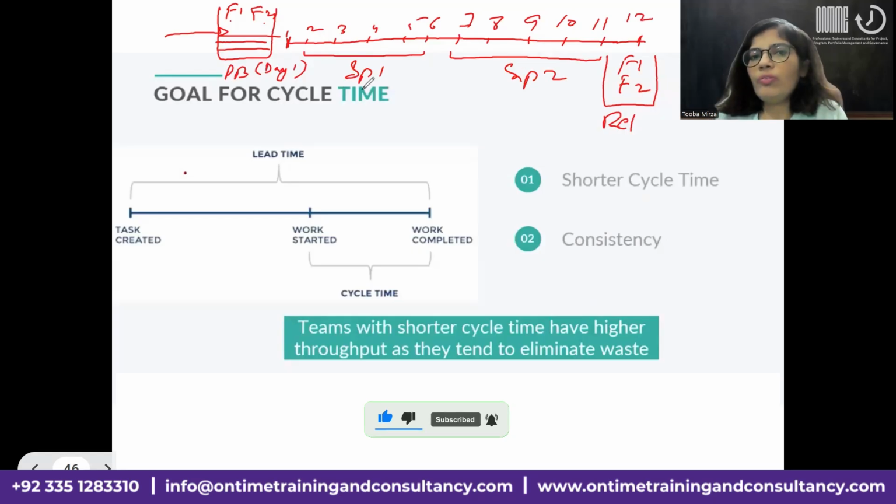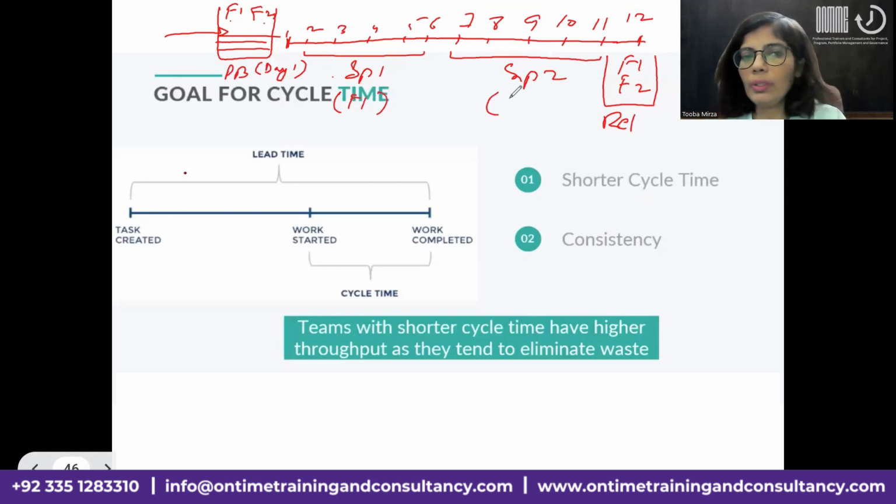Although before our release, you should have some hibernation period or blackout time, right? So you should have that, like maybe in this case, you just have that 1 day in between. So this is the sprint 1 and sprint 2. And sprint 1 is completing the feature 1. And sprint 2 is completing the feature 2. So this is how we have assigned.